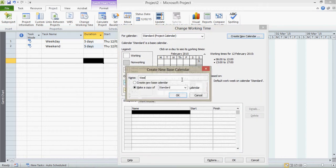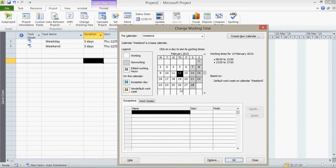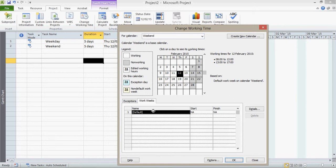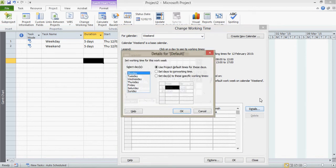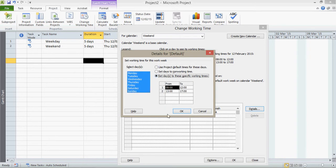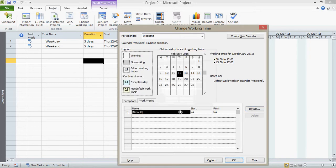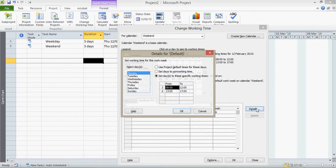And at the moment it's a copy of the standard, but now you'll notice up here it says weekend calendar. So what I'm now going to do is I'm going to change the default working week times for this calendar. So I click on work weeks and click on details. And I'm going to now say the easy way of doing this is just to say use those working times for everything and then go back into it and specify the days that they're not working.